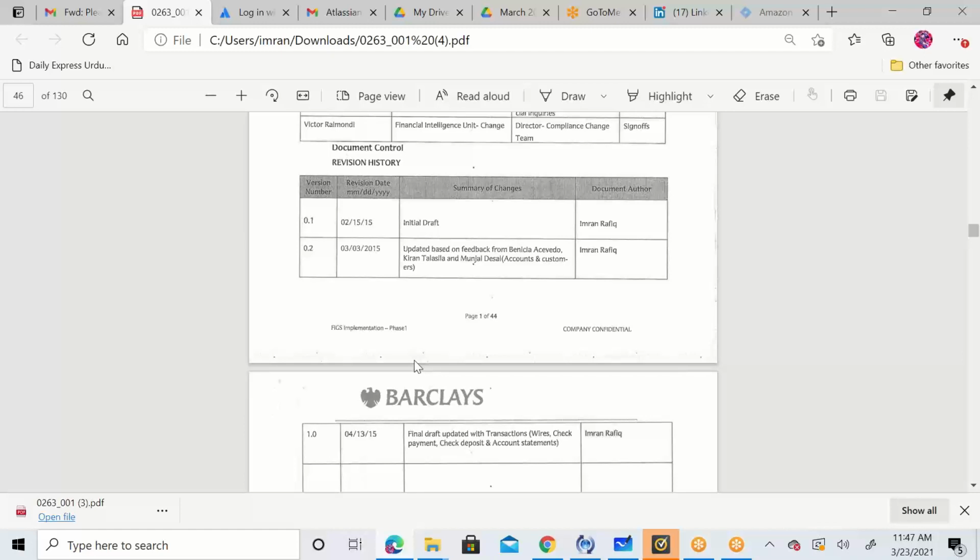In some places you can do it right away, in the document itself. The best approach is when your document is complete, whatever review they have done with you, you simply put it down in the revision history. You really don't need to send them email to verify that this is what we've discussed. You don't need to do that. You will only annoy them. Why? Because they would simply tell you, okay, you do this document. Once you're going for review and sign off, you have to send it to us, and we have to reread it.